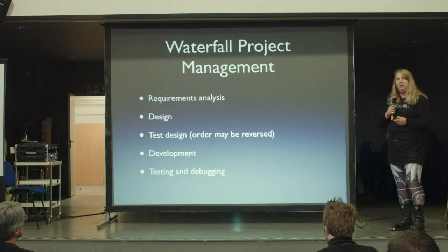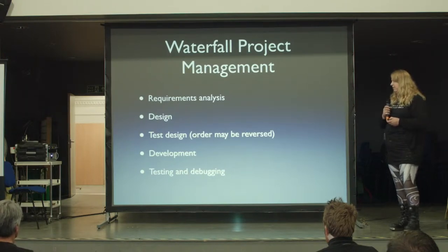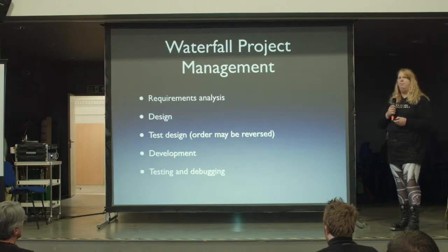Basically, each previous step, so the requirements analysis, will save you a lot of time in the design stage. Designing it properly will save you time in the test design and development. And if you develop it and test as you go along, you'll have a very small debugging stage. I once got told in a previous job that 80% of the job was debugging, and I kind of career suicided by saying, well, you didn't design it very well, did you?